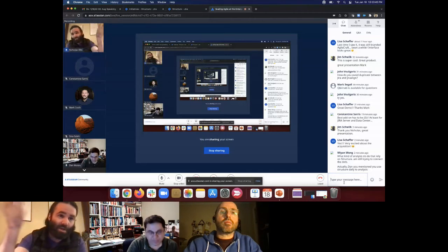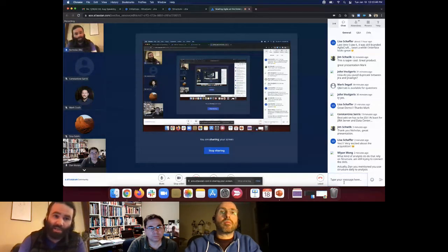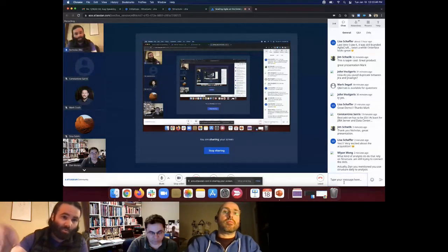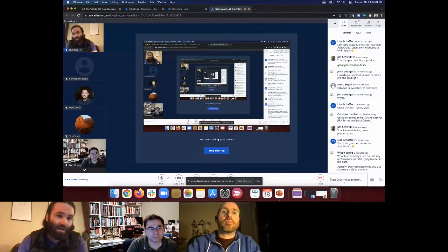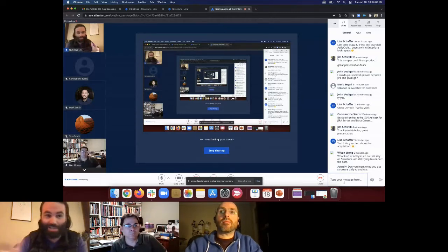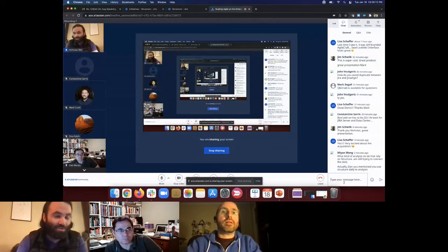On the epic level we said, this is our hourly rate or our story point rate, and then we multiply our estimates by that. So we say this thing is estimated at one week worth of work, which is 40 hours, and we know we have an hourly rate of $100 an hour. So that's $4,000 to accomplish this epic. Then, not only could we do the cost reporting, but we could also do cost overruns. We would say, this epic was estimated at one week, it took 6 days worth of work, so we had an overrun of 20%.